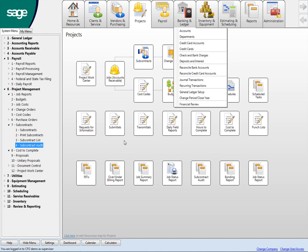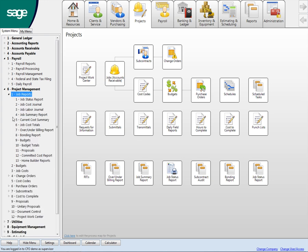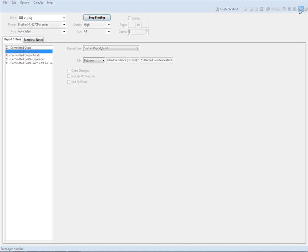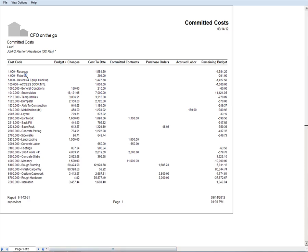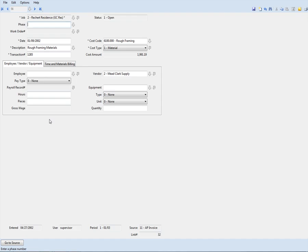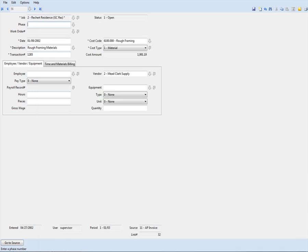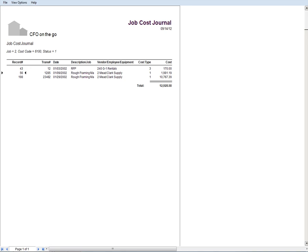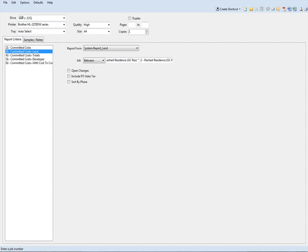Pretty much that was your list. But cost of complete analysis, so you can do forecasting, all kinds of job reports. One of my favorite committed cost report. So basically it takes your items, your budget plus approved change orders for cost, your cost to date, outstanding subcontracts, subcontracts that have been written but you've not been invoiced for yet, and the same thing on the purchasing to give you a true remaining budget. And again, if I want to see how I spent $12,000, which probably in your job you get asked a lot, I can scroll right back. Those are the three invoices, two vendors that I dealt with. These are the amounts that I pay to them. If I want to roll right back to, that's the actual invoice that was entered into AP. So, great way to drill back the information, not have to bother the office to get that. It's all going to be at your fingertips.